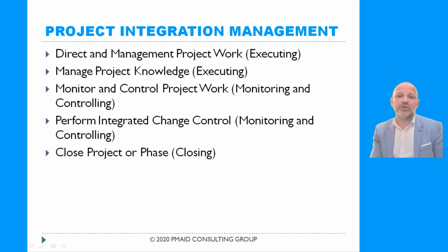Perform integration change control, monitoring and controlling process. So this is the process of issuing a change request. How does it work? If we see that the change is required, and we'll go through the specific details in the next slide, but if we know that a specific change is required due to some circumstances, our stakeholders, for example, say, you know what, we don't need this feature anymore, instead we would like to implement this. Then the project manager says, wait a minute, we have our budget approved, we have our schedule developed. We need to see if we can include this change into our scope.